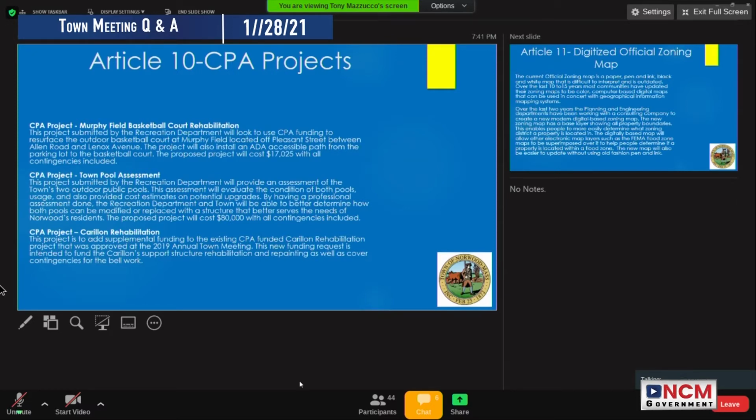We've selected the current Coakley site. Right. We're going to site the new middle school. We're not yet at the point, and I don't think the school committee is deciding until June or July, on whether it's going to be a 6-8 or a 5-8. So that will inform what the building's going to look like. In theory, the feasibility study and the master plan would be done well before we even look at a schematic design of the building.